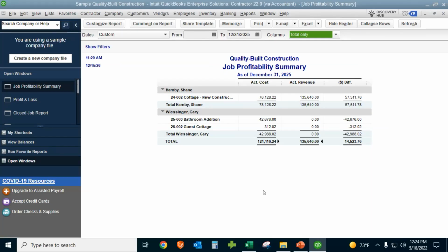Now we show big underbilling, because we really should be dating that invoice June 30th rather than July 10th. So it's even worse, we don't run the percentage of completion calculation and it looks like your current ratio is underwater by an additional 60 grand. Yeah. So these work hand in hand with the users and what they want to see. Yeah. It's an important process.